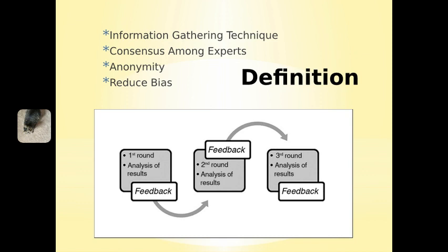This is completed through a facilitator and the use of a questionnaire that solicits information from experts regarding crucial project points. The responses provided by the experts to the questionnaire are summarized and then recirculated to the experts for further comments. A few rounds of this process are completed in order to reach consensus. The circulation of expert feedback helps to reduce bias in the data, and it keeps any one expert from having undue influence on the outcome. This process also decreases the range of the answers, and the group will converge towards what is considered the correct answer. The information gathering rounds are concluded after a predefined stop criterion, such as the number of rounds or the stability of the results.